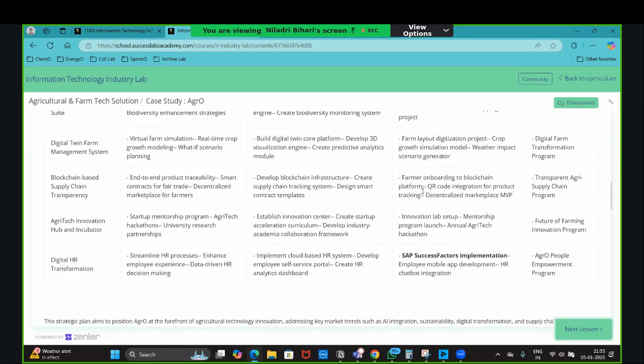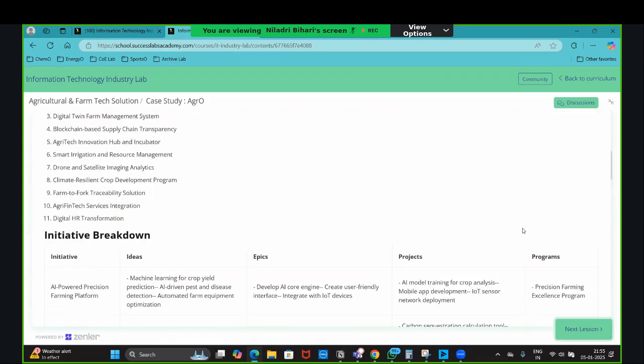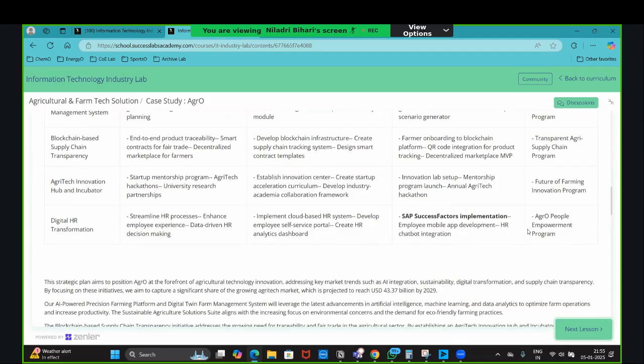And before the project, you will give a name to the program as well. So what is the difference between program and project? Basically, a program is a larger landscape where you will have multiple projects under HR. If it is a large organization, different teams are acting, and you will have a program manager and a project manager. The program can go for 3-4 years, but each project inside it will be implemented in 6 months to 1 year.